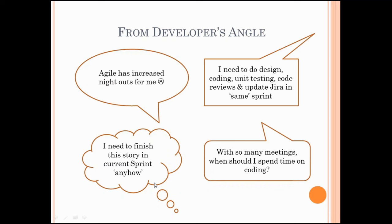Because of this thought process, a problem arises: team members might think, 'My scrum master is forcing me to finish this story, so let me finish it anyhow — even if that means taking shortcuts.' That means skipping unit testing, skipping code reviews, skipping basic design practices, just to get the story done and push it to the testing team — letting them figure out the defects instead. They just want to get it off their plate because they don't have enough time.